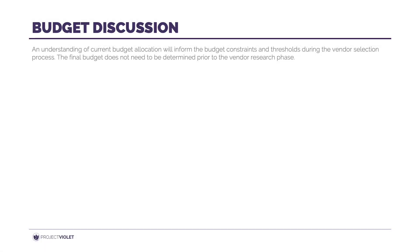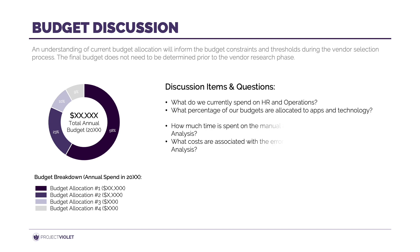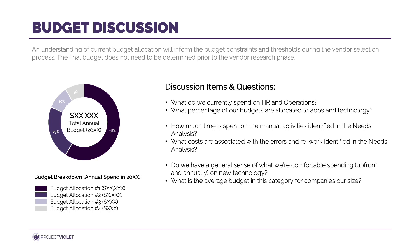In the preparation phase, it's also good to have an understanding of your budget, as this will help eliminate a lot of vendor choices in the research phase. Set up time with your CFO or whoever runs the finances and have a discussion around potential budget allocation. This template can be a facilitation tool for that meeting, showing how money is spent today on internal operations and helping set some budget parameters.